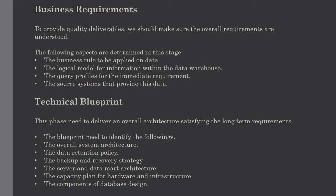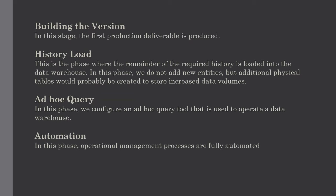The next phase is the technical blueprint. In this stage our data warehouse will start to take shape. This phase needs to deliver an overall architecture satisfying the long-term requirements, and also deliver the components that must be implemented in the short term to derive business benefit. The blueprint needs to identify the overall system architecture, data retention policies, backup and recovery strategies, server and data mart architecture, capacity plan for hardware and infrastructure, and the components of the database design.